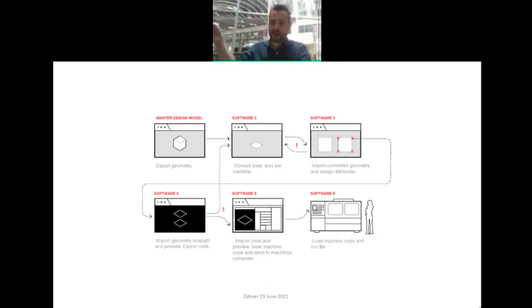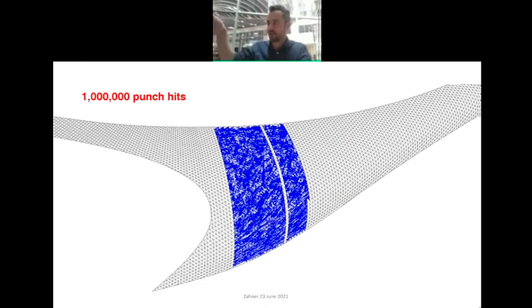With these tri-skins, and this is just a small section of the building, you can see the perforations, and this is from our Rhino model. There are 37,000 skins that form the facade on this building. One of the huge challenges here is simply the scale of processing 37,000 completely unique skins with unique perforation patterns in the right order, efficiently, and then getting them to the project site, again in the right order, efficiently, with the surface finish not affected.